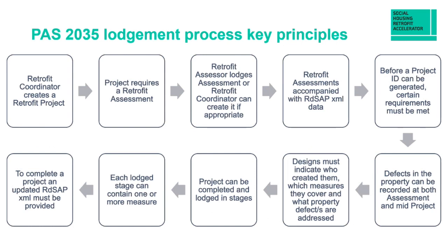The retrofit coordinator is responsible for going into the data warehouse and creating a retrofit project on your behalf. The project requires a retrofit assessment, as we've mentioned, and the retrofit assessor would lodge that assessment. The retrofit coordinator can also create that if appropriate. The retrofit assessment should be accompanied with the relevant RDSAP data, and a project ID can then be generated, but there are certain other requirements that must be met.